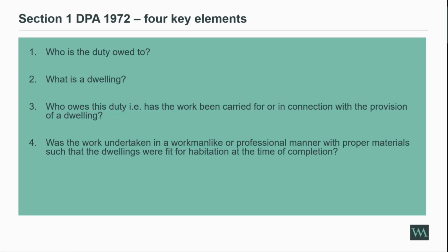So the next question we need to look at is who owes this duty? This is basically a question of whether someone is taking on work, and again, it would depend on the facts in each case. But generally speaking, the way we analyse this is we look at who does work which positively contributes to the creation of the dwelling. It's quite obvious that that includes your contractors, because they physically take on work which constructs the block of flats or the house, so it constructs the dwelling.